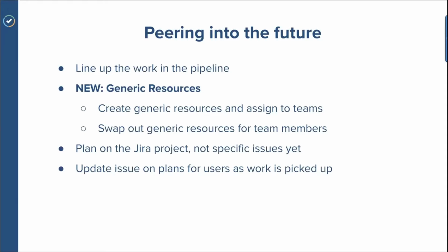You can use generic resources to visually have an idea of when you will need a certain kind of resource for a future project. We also embed generic resource as part of a team as well. So you can have an idea of who will complete the work, and then you can assign it to a person on the team easily. And I'll show you that. But you won't be able to get these generic resources in your reporting. So keep that in mind, that this is a visual representation of what you will need down the line.